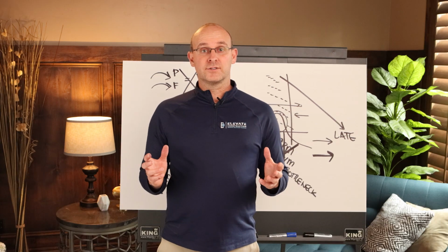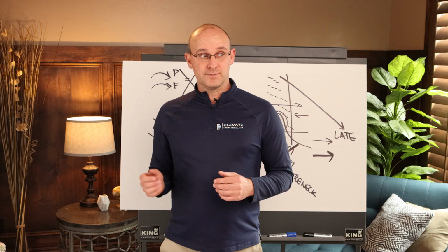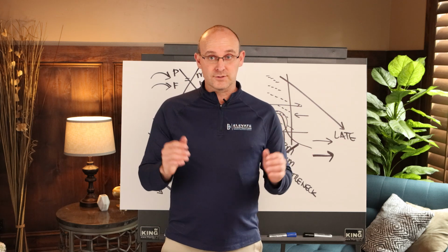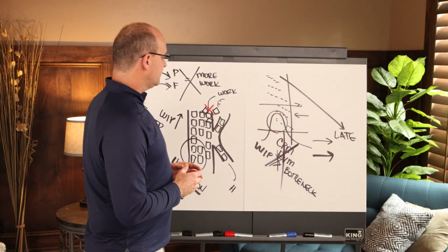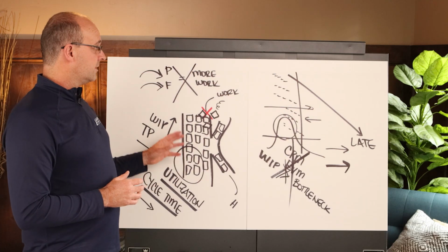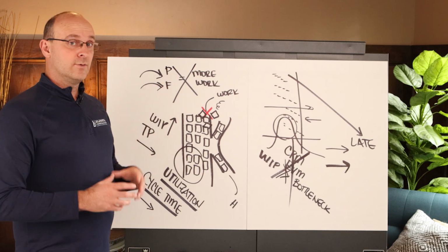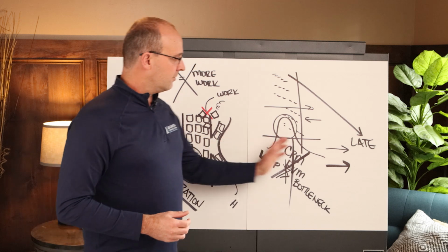This is why projects start to run behind schedule. It's not typically just, oh, I missed the materials or our workforce sucks, which is not true. It's not the typical things that you think. It's the Bungee effect, and it's us not understanding this concept, rushing, pushing, and panicking, and adding more people, which gives us the Bungee effect, not only with the labor itself, but with these overall concepts.